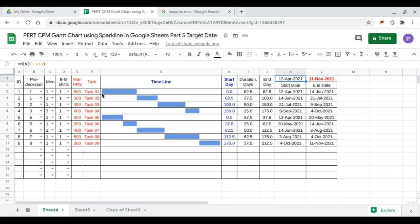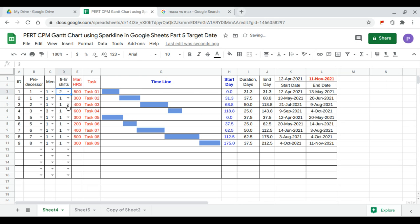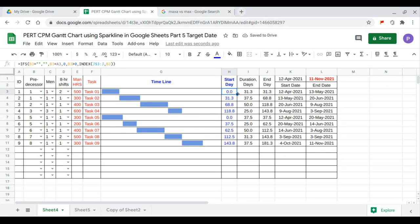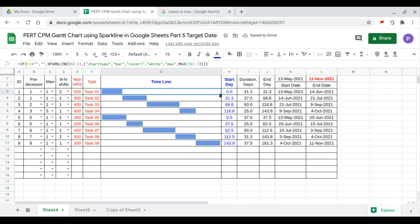Let's say I'd like to have two shifts on task 1 and two shifts on task 7. After updating both, our starting day is now May 13, 2021.